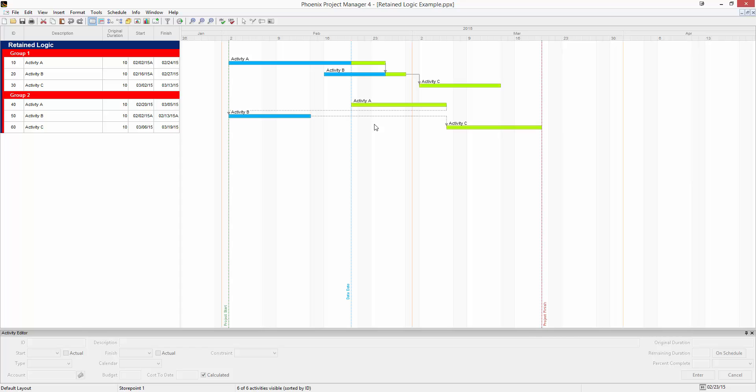In group two, activity B started and finished before activity A even got underway. In this example, since relationships under retained logic are still respected, activity A is now holding activity C out.